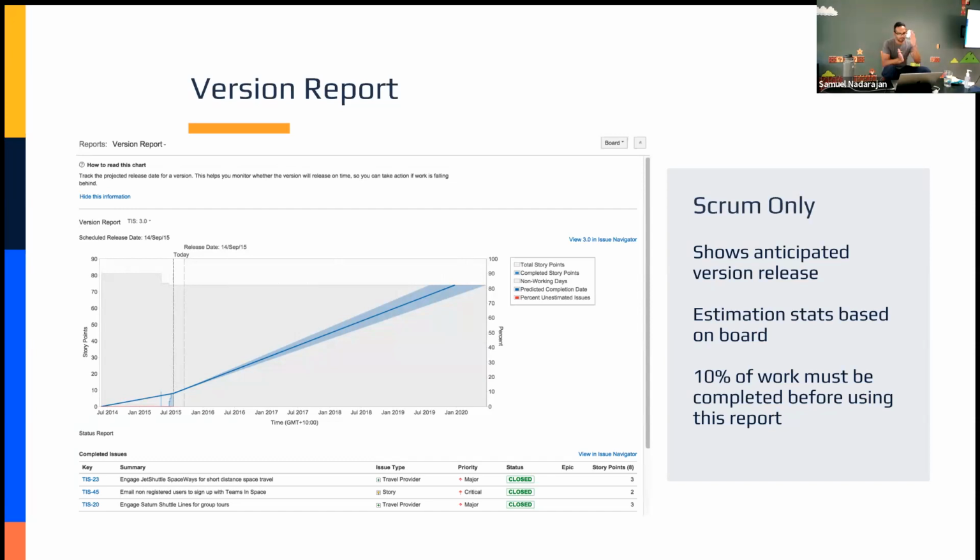So if you're above that line, that means you are completing your work, or you're hitting that ceiling sooner. So that's your optimistic view. Your pessimistic view is, of course, anytime you're below that line. So if I'm looking at this data point right here to get to, I don't know, 83 points of completion, instead of completing it around July of 2019, I am completing it around December 2019 or January 2020. So below the line is pessimistic, above the line is optimistic. I'm glad we figured that out in this session right here.